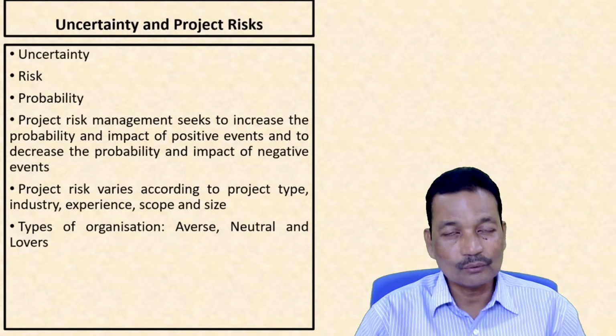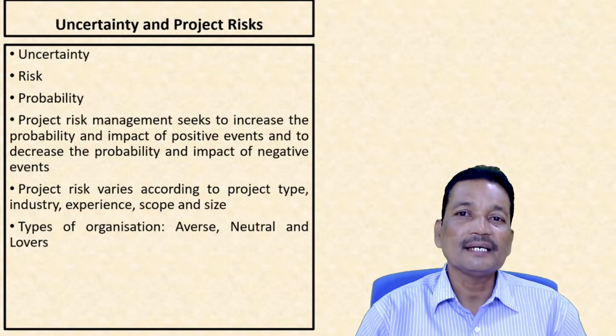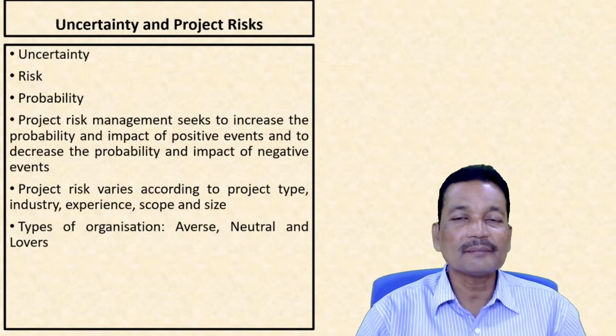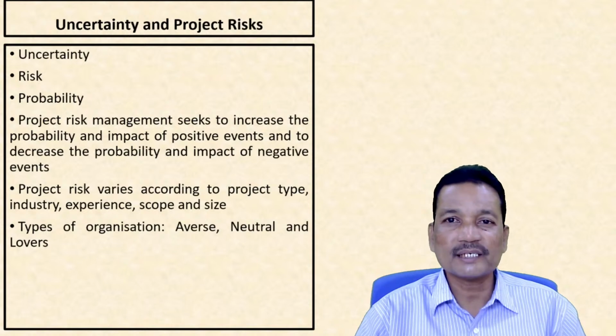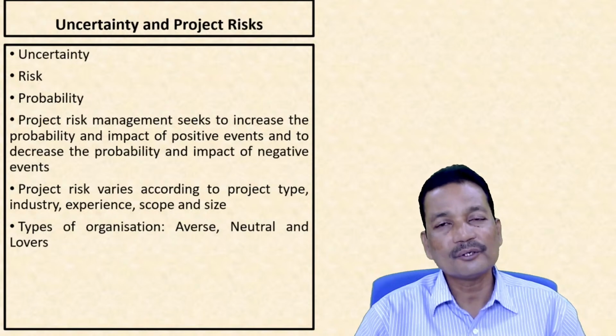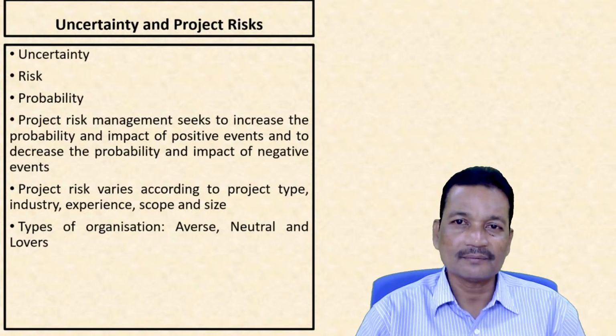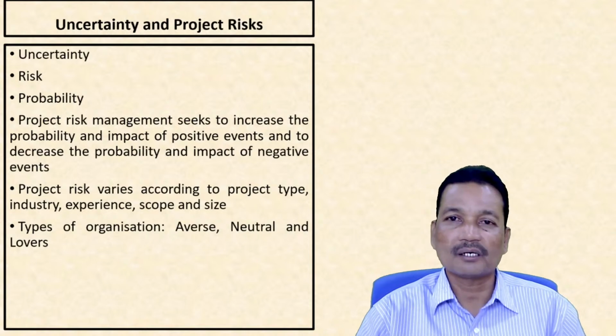Now is it good or bad? The answer is the deviation is increasing the project activities duration. Thereby, the whole project may get affected by this higher duration of the activity. Thereby it will lead to the project time overrun, which is bad.